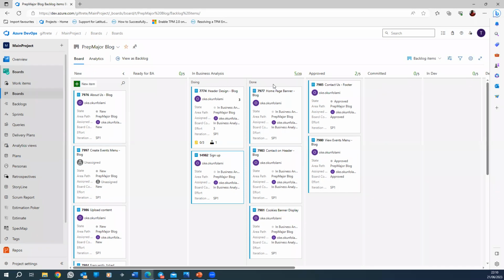A lot of times the developers or the testers will ask you, have the stories been approved by the product owner? And you say, yes, they've been approved. And then once you've done sprint planning, they will move the stories to Committed. That's the Scrum Master's job. Approved means the product owner certified it, said it's okay, so you have that authority.